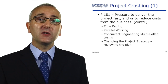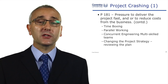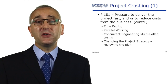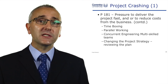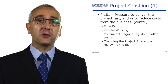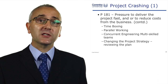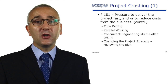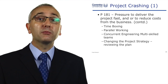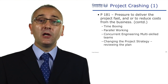Time boxing puts a focus on delivery of tasks. Working on tasks in parallel — concurrent working of individual tasks. Overlapping the tasks using lead time would partly get you the same benefit. Concurrent engineering of whole phases of the project: in a multi-disciplined environment, you're asking your manufacturing people to start work before your design people have delivered the product. Change the project strategy. Review the plan.